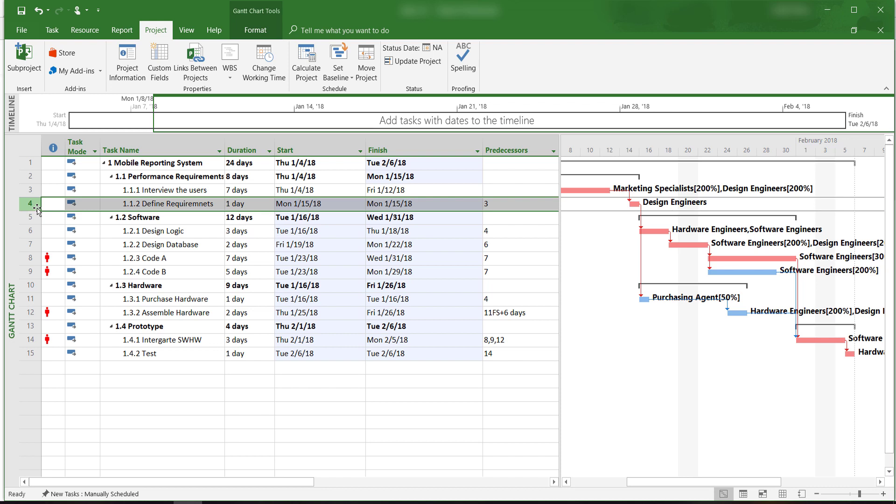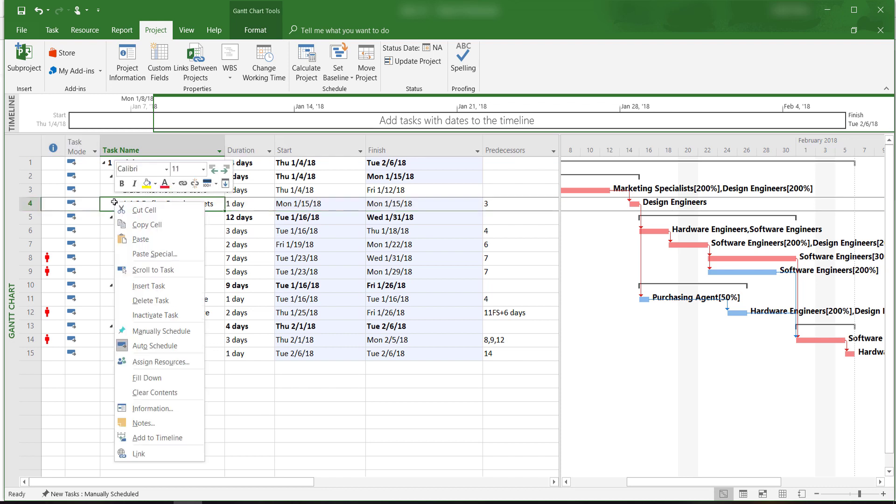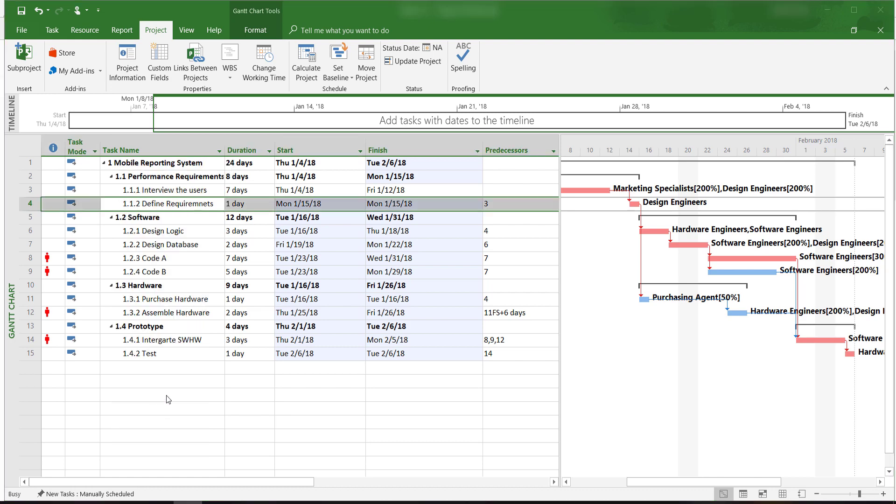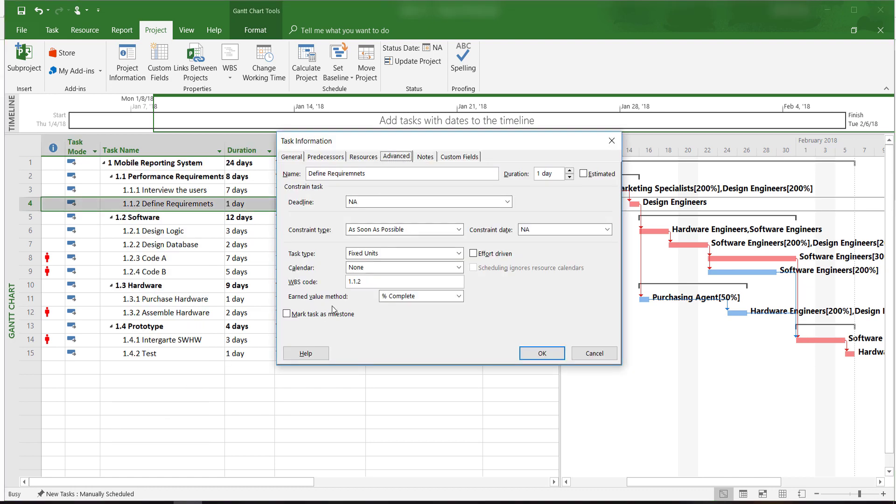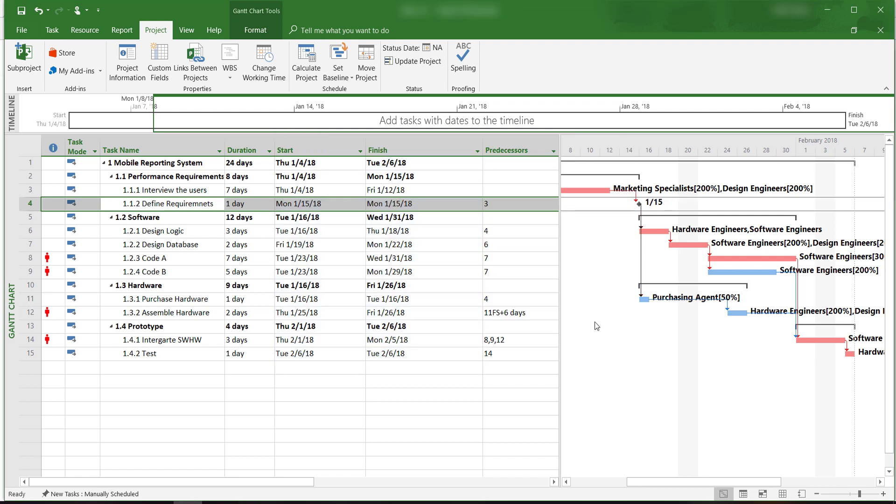We can simply double-click on this task, or right-click and then select Information, click on the Advanced tab and then check Mark task as a milestone. After we click OK, we'll notice in the Gantt chart view that a milestone symbol will appear, marking the completion of this task as a milestone.